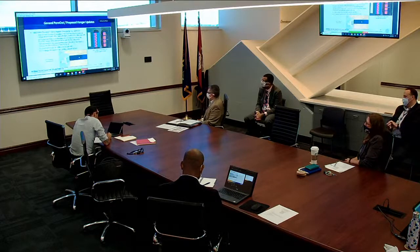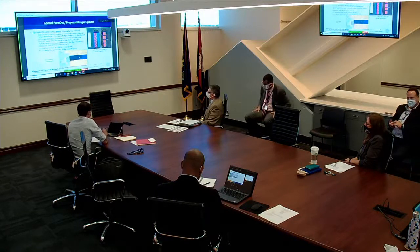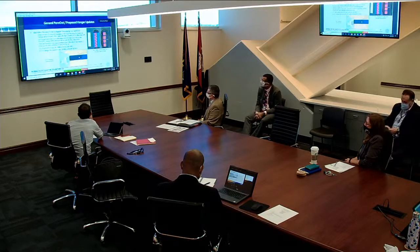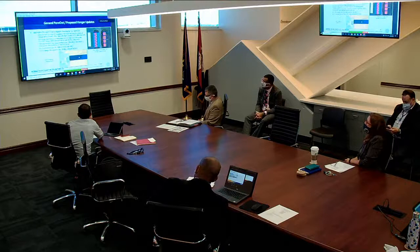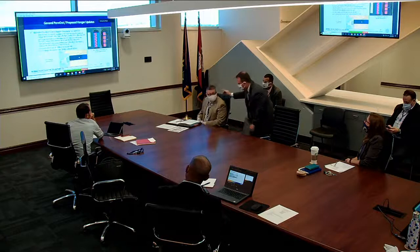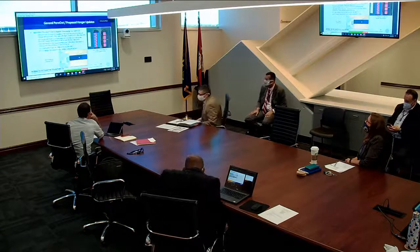And I know we've talked about that a little bit in some of our other committee meetings regarding how you can break up the civil and building construction, or at least a phase development. For example, for Queen City, the picture on the top right, there's a set of T hangars and four individual larger single unit hangars. So we could definitely phase that approach to take little pieces of the pie for the capital budget. As an example, the total build out of all that is about 6.3 million, which is again a pretty large price tag.